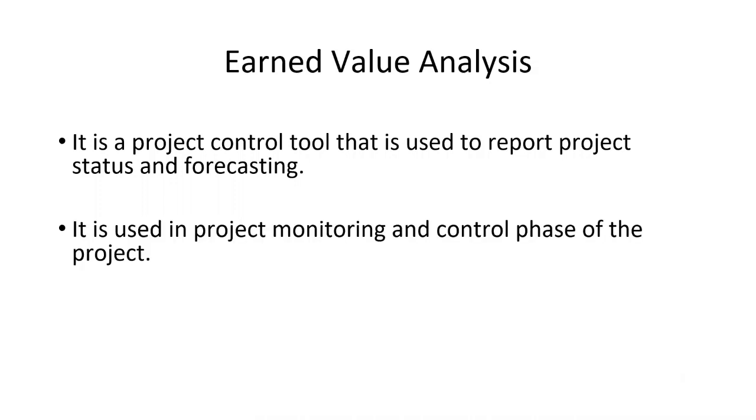And it's used definitely during the execution phase, but it's specifically used in the monitoring and control phase of the project. The data is gathered in the execution phase, but the reporting and the analysis and the calculations are done in the project monitoring and control phase. And again, there is just a fine line between where the execution phase stops and where the monitoring and control phase starts.